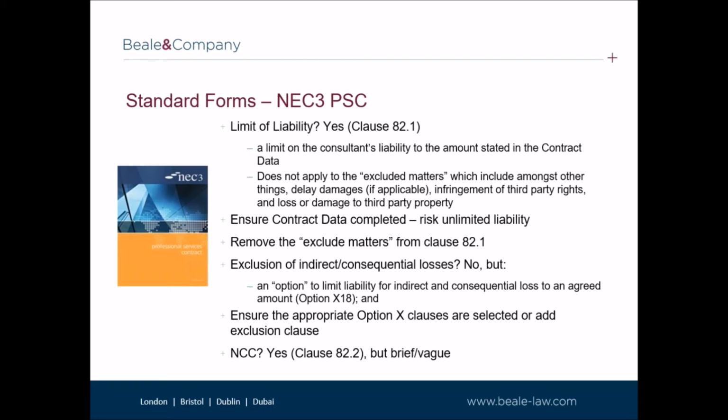Turning to net contribution clauses, as Will mentioned earlier, whilst the standard form net contribution clause is included in Clause 82.2 of the NEC 3 PSC, the drafting is brief and without the usual bells and whistles which a standard net contribution clause should contain. Whilst the inclusion of this narrow net contribution clause may be an acceptable starting point, where possible, I would suggest the drafting is amended to reflect the wider wording discussed by Will earlier in this webinar.